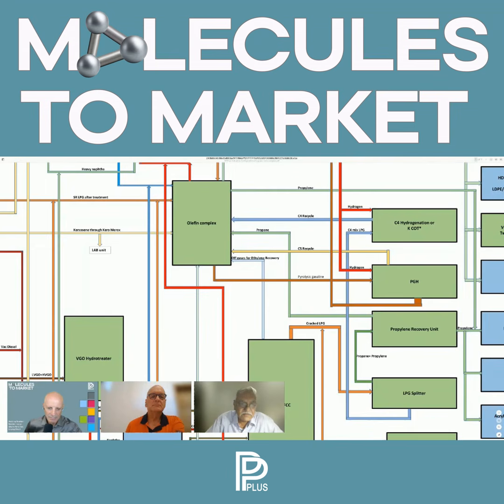Because if I am going to give a cost number and guarantee to the board, I must tell them that it is subject to these conditions. And one of the conditions is what is the assumed mode of implementation. Because mode of implementation impacts the overall capex. It should not be that I start on EPCM and mid-course, when the approval is given for investment, I decide that partly I'll go for EPC. No, it will have cost implication, and that the board has to be informed. And nobody likes to go to the board again and again and again.